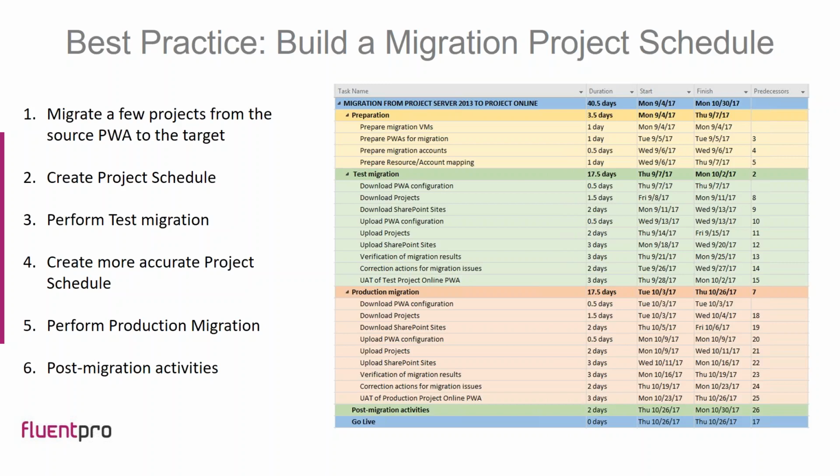After the test migration is completed and its results are approved, you can proceed with the production migration, and based on the results of the test migration, you can create a more accurate and precise schedule with regard to the estimated durations and efforts for the migration.